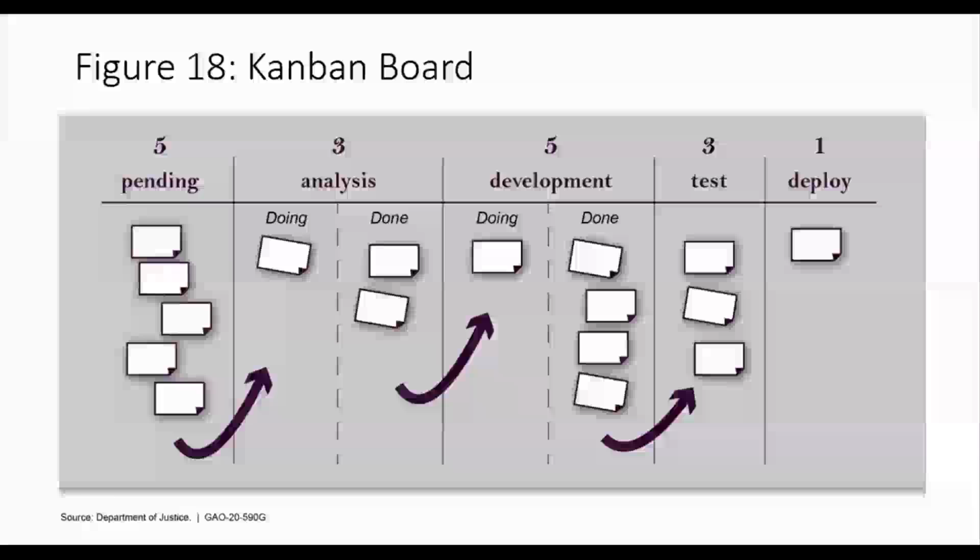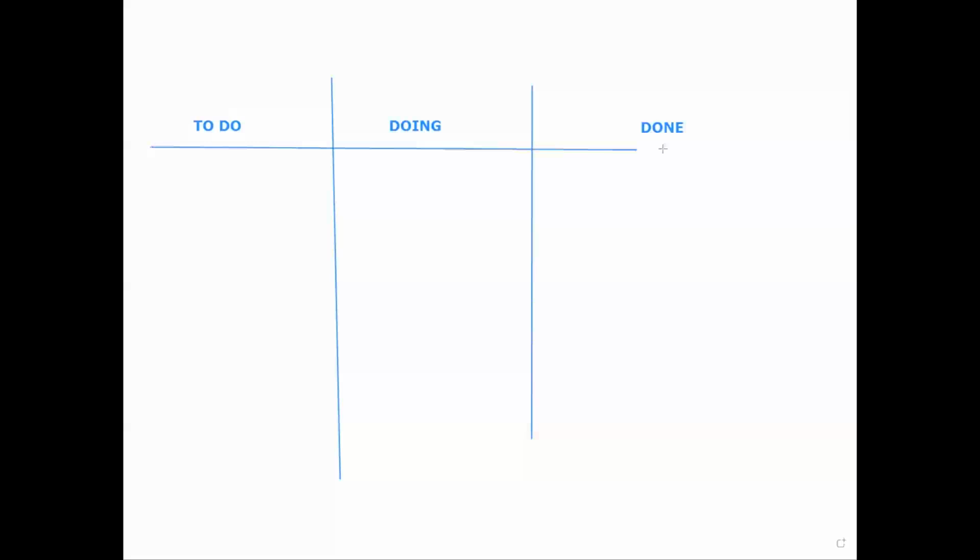You could have 3 sections of items that are in the to-do section, items that you are currently working on, we'll call them doing, and items that are done. And this is the simplest of the Kanban boards: to do, doing, and done. You could start wherever you are in whichever type of process with Kanban. It has a start where you are mindset.